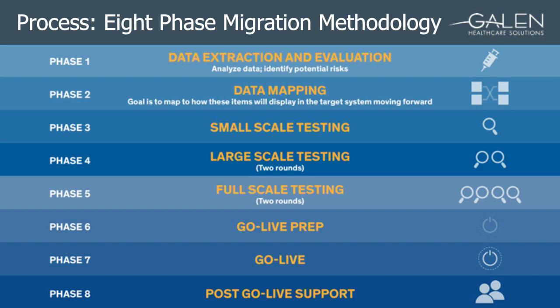A recent example of this is when we were evaluating how medication information was being stored in the legacy system. We found that the legacy system was not correctly storing the prescribed dose in the database. It was only storing the strength of the medication. So we had to work with the client to determine the safest way to convert the data without populating misleading or incorrect information into the new EHR.